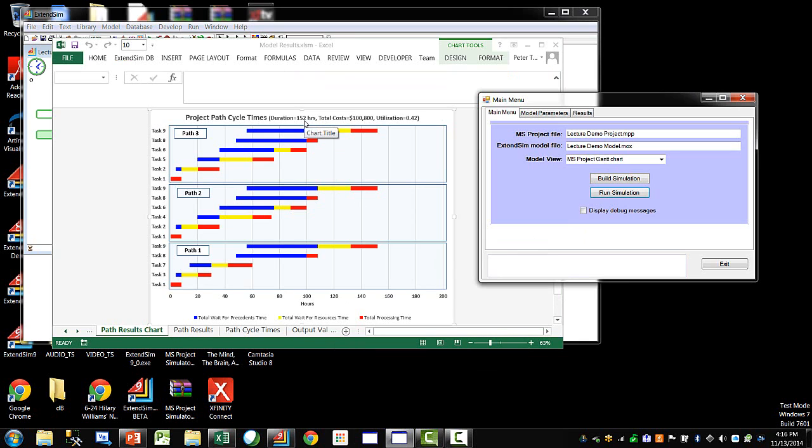So we're at 152 hours here right now. That was by adding 1 resource. Wow, big drop, big drop. Same cost, because basically we're just increasing the length of the day, which ends up being the same cost as adding a resource with a shorter shift. Tremendous drop in our duration. Utilization sitting there pretty low at 43%.